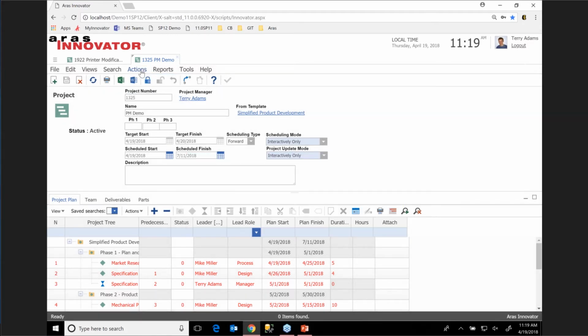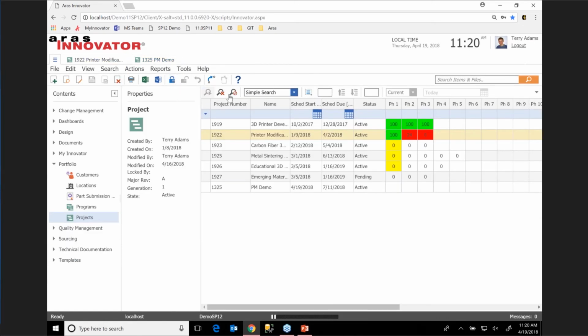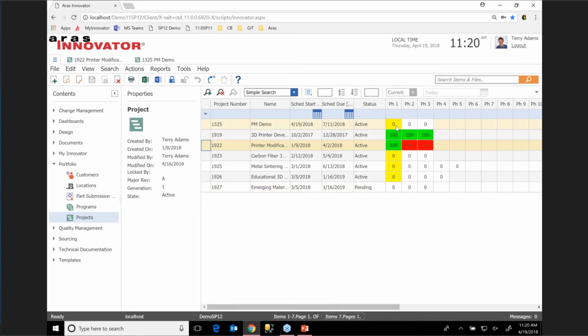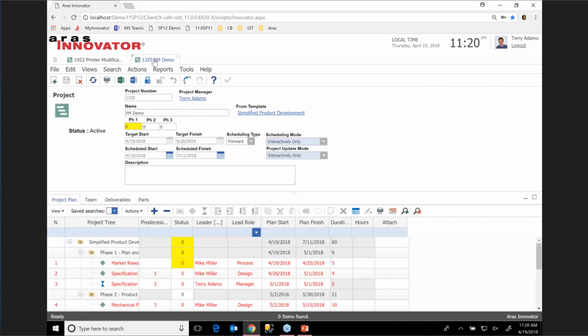Now there was no update because it's a new project. And then schedule the project. Upon scheduling, we're going to see that status change. Now remember that we started the project today, and so our status color is yellow, because we have a day to start this activity, okay? Remember, this is less than 6 days and no more than 1 day. So right away, we see the overall status. We can go into search, and we're going to see that this is live updated for us.